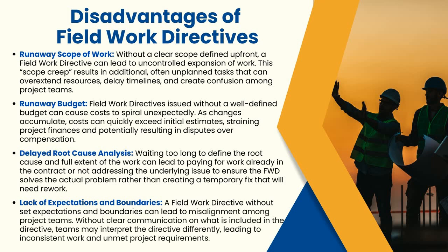We also need to look at the root cause analysis. When you wait too long to define the root cause of the issue and the full extent of the work, it can lead to paying for work already in the contract or not addressing the underlying issue to ensure that the Field Work Directive solves the actual problem, rather than creating a temporary fix that will then require rework in the future and therefore will be money not well spent that has to be redone.